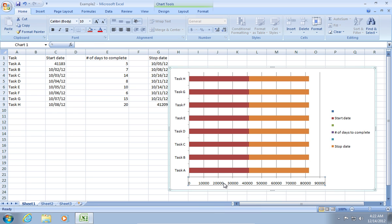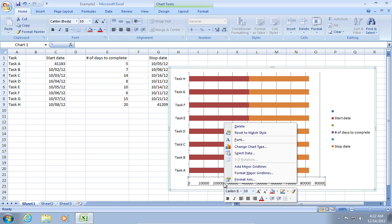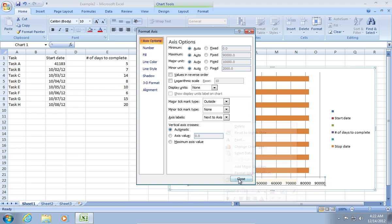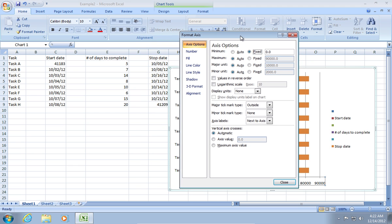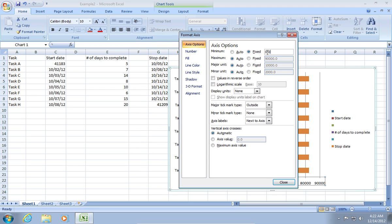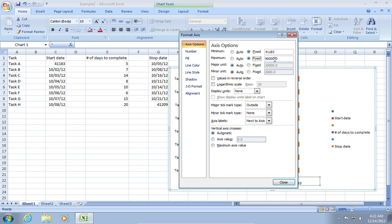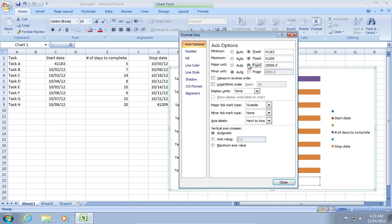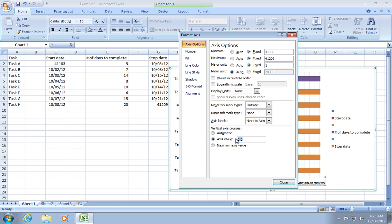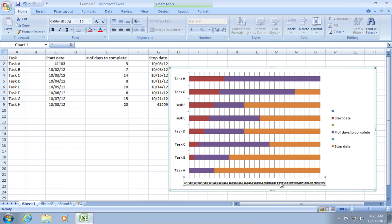Now, select the data under the chart. Right-click and choose Format Axes. Select Fixed to Minimum and set the value to your C2 cell, in our example 41183. Also, select Fixed to Maximum and set the value to your G9 cell, in our example 41209. Change the Major unit to Fixed and set the value to 1. Then, set the Axes value to 41183 in the Vertical Axes Crosses.